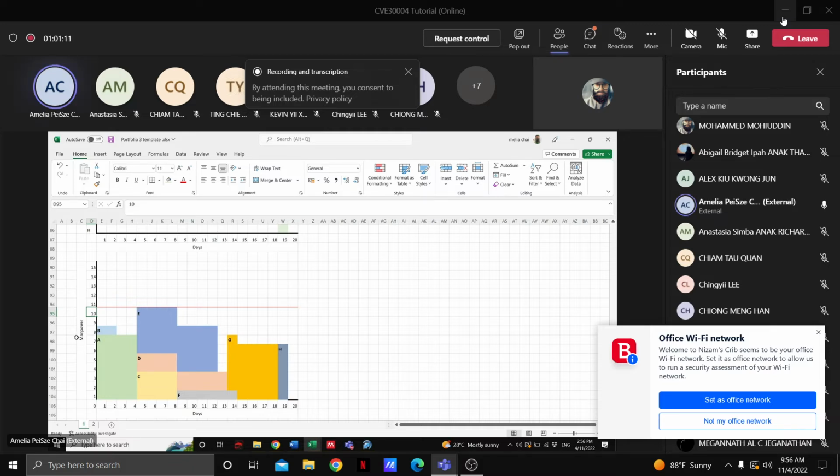In some cases, we try to use minimum manpower to get the things done, right? So maybe you can adjust it to get even lesser manpower. But in our case, it's only 10. So that's the purpose of resource leveling. We're trying to save money for the project.